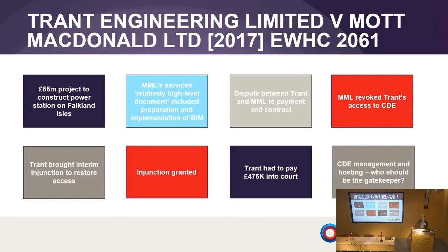They then brought the interim injunction to say, if we have to start a new common data environment now at this stage in the project, our losses are likely to exceed the £1 million liability. Mrs. Judge, my mistake, can you please get the CDE access revoked? Mott MacDonald said it wasn't fair, they were owed too much money. The judge took the view, Trant had to pay into court, I think it was about £500 million, and Mott MacDonald had to revoke access.